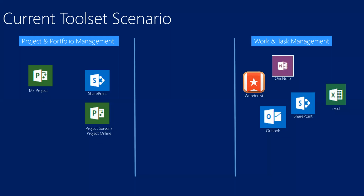So the problem here is, like I was explaining, there is no connectivity between these two. Almost always, it's manual. So you probably will generate a project plan in Microsoft Project. Then somebody else will take that and split it into tasks in Jira. But then the update on Jira will have to be sent back to Project on a manual basis unless you are building integrations back and forth. So it's mostly manual.